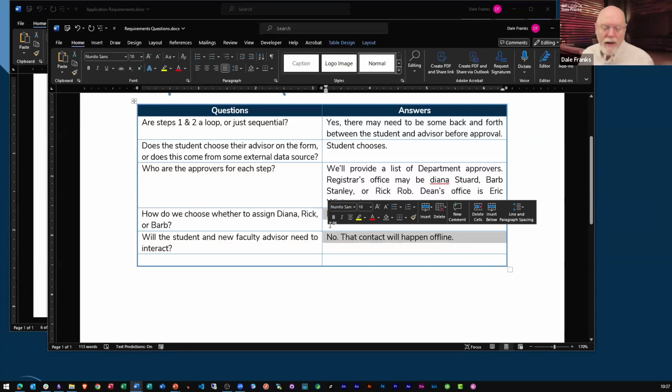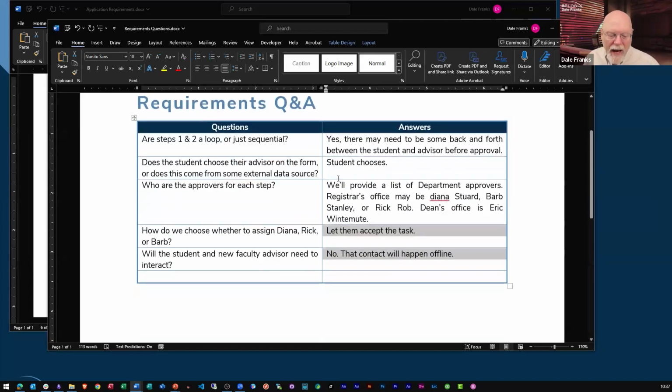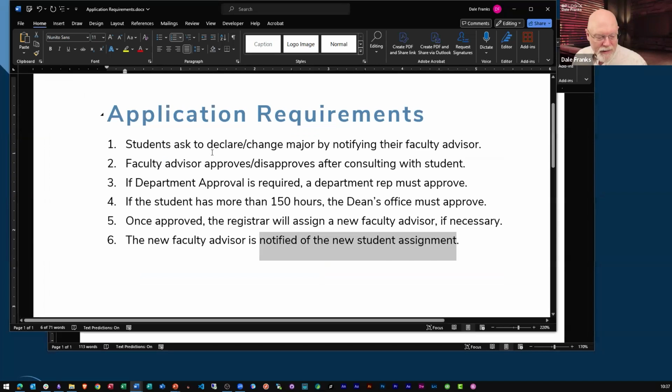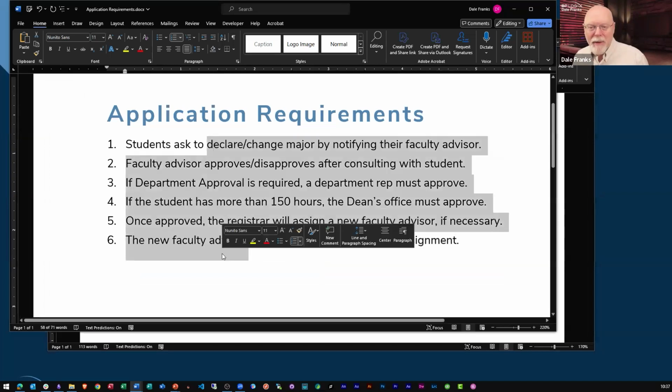because I need to know if anything else will happen. So I'm going to have a lot of questions that I'm going to need answers to. And so having a Q&A matrix like this that I can take, I'm going to append it to my requirements document, number one. And number two, the answers that I receive in the answers column are then going to get appended somewhere here in this application requirements section as I begin to build out individually every single activity that's going to occur, who's going to do it.